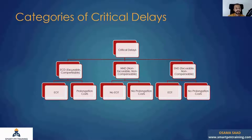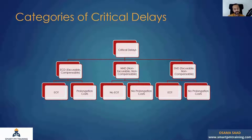ECD is Excusable and Compensable. When we refer to the term 'excusable,' it is related to time — so it's time related and often related to extension of time claims. For 'compensable,' we relate to cost. So when we say it's ECD — excusable and compensable — there is an EOT entitlement and there is a prolongation cost entitlement as well. The contractor should be reimbursed for the additional costs because of the time losses.